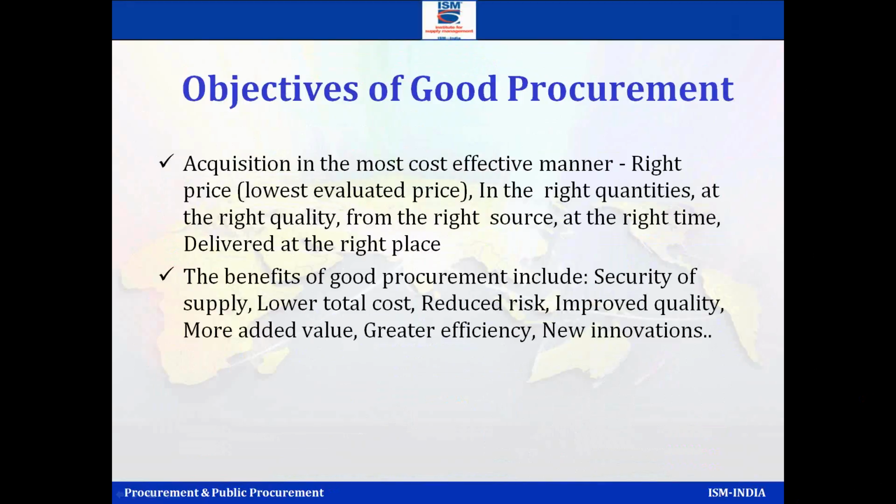Now, right price, when we say it, we are not saying the lowest price. We're saying lowest evaluated price. Somebody may be charging you 10% extra, but the features which they are giving are much better. They meet your expectations. The warranty is better. There are some other features. So you look at whether you're getting the right price.